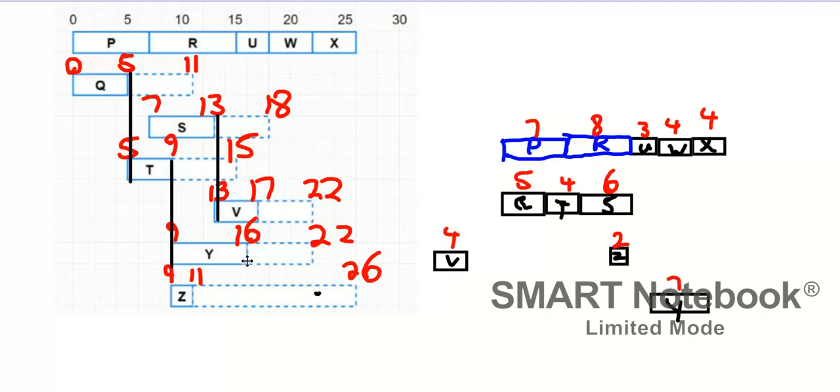V or Y. Now remember, the old constraints don't matter anymore because we're not sticking to 26 minutes. You just got to make sure, would I be allowed to put X ahead of W as an example? Because W feeds into X. So you have to make sure that your order makes sense according to your diagram. Okay, so like what's said, right? Said usually goes right at the end, doesn't it? Would it be okay for me to slot said up here? Why would I not do that? I need some of the other activities to happen first, don't I?